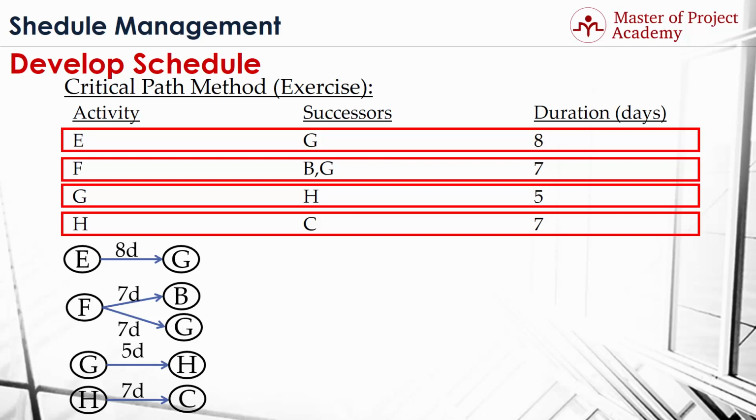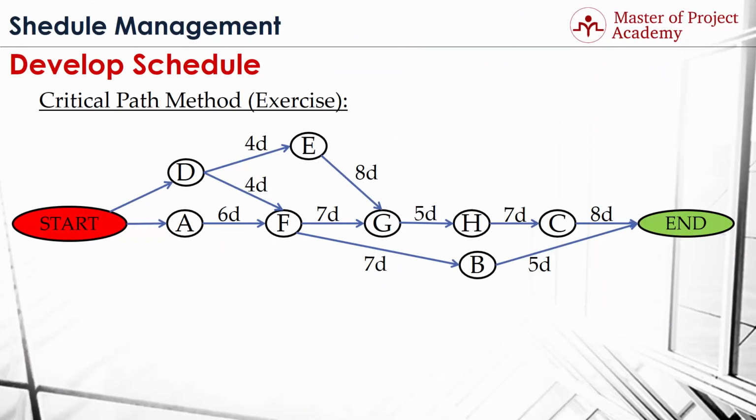We have completed defining the interrelationship of 8 activities. The next step is connecting these relationships with each other to construct the overall network diagram of the project. And once it is done, you will reach this network diagram. As you see, it includes all activities, duration of activities, and relationship of activities from start of the project till the end. It also includes all possible activity paths from start till end of the project to complete the project. We will go over these paths one by one now to identify the critical path of the project.